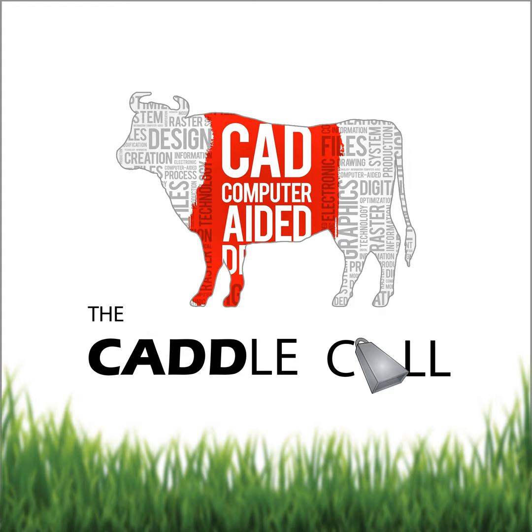All right. So look, the second area, I said there were two areas that Revu tool sets address. The second area is quantity takeoff and estimating. And to my mind, in my personal setup here, this is where the truly powerful side of the tool set concept comes into play. We can build predefined takeoff items, not just markups like sketches, but actual intelligent takeoff items that will measure length and area and volumes and do item counts directly from your tool sets, right?